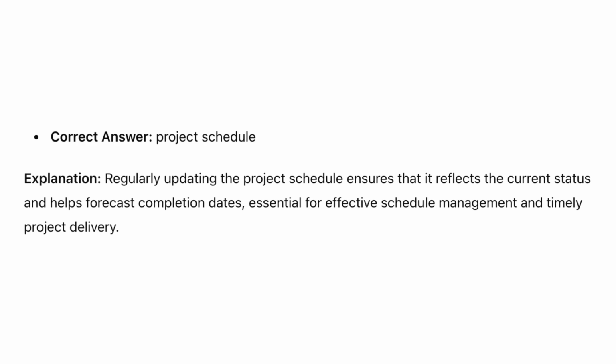Correct answer, project schedule. Explanation. Regularly updating the project schedule ensures that it reflects the current status and helps forecast completion dates, essential for effective schedule management and timely project delivery.